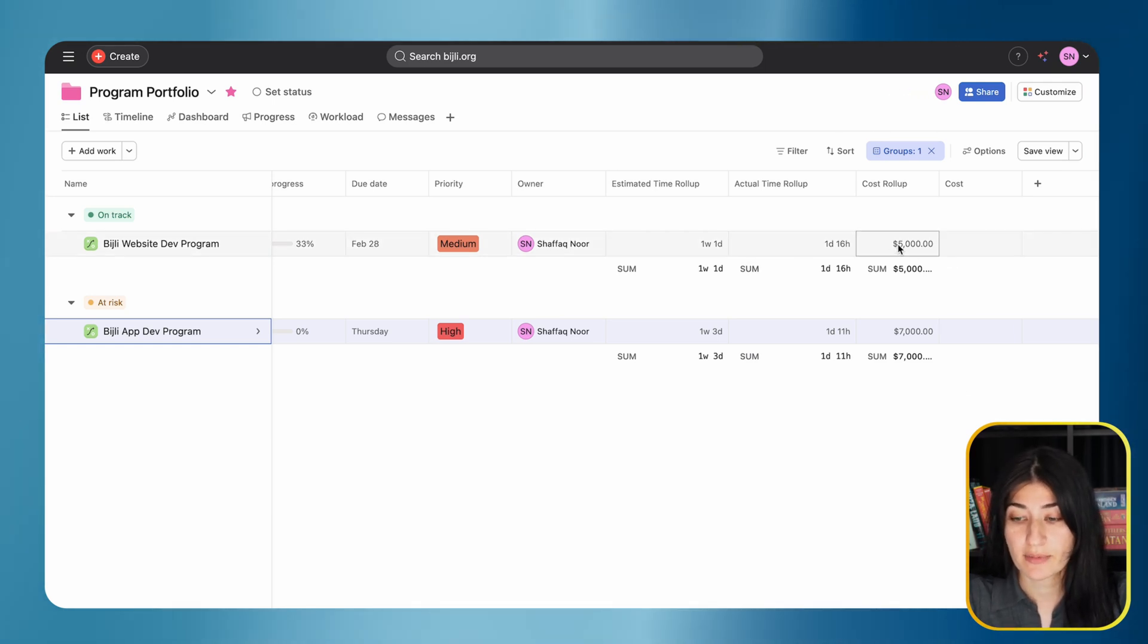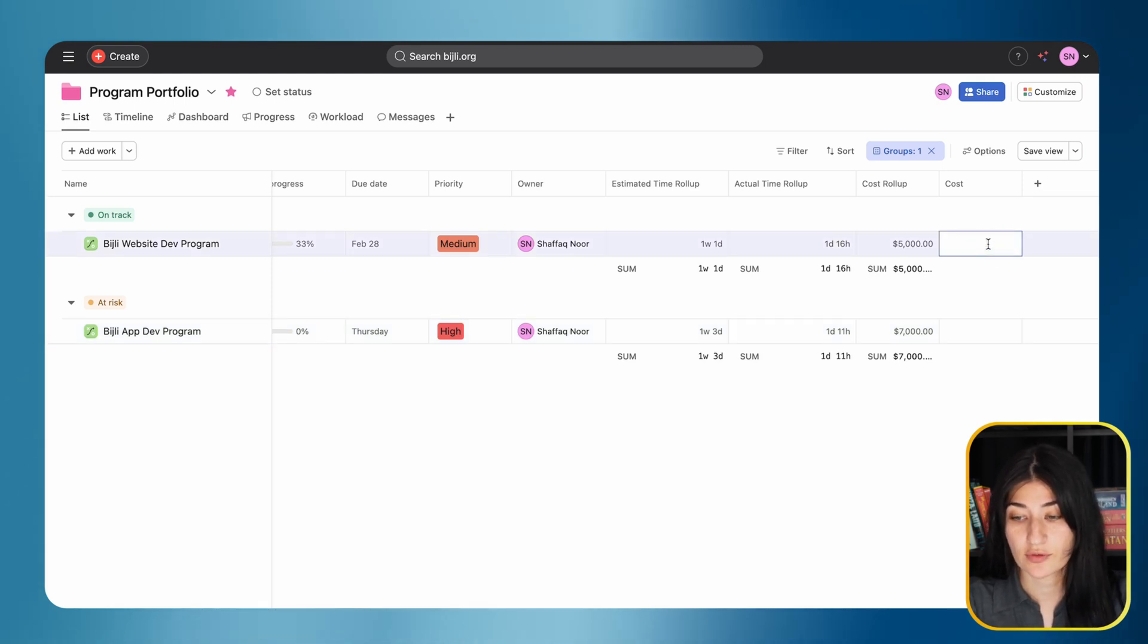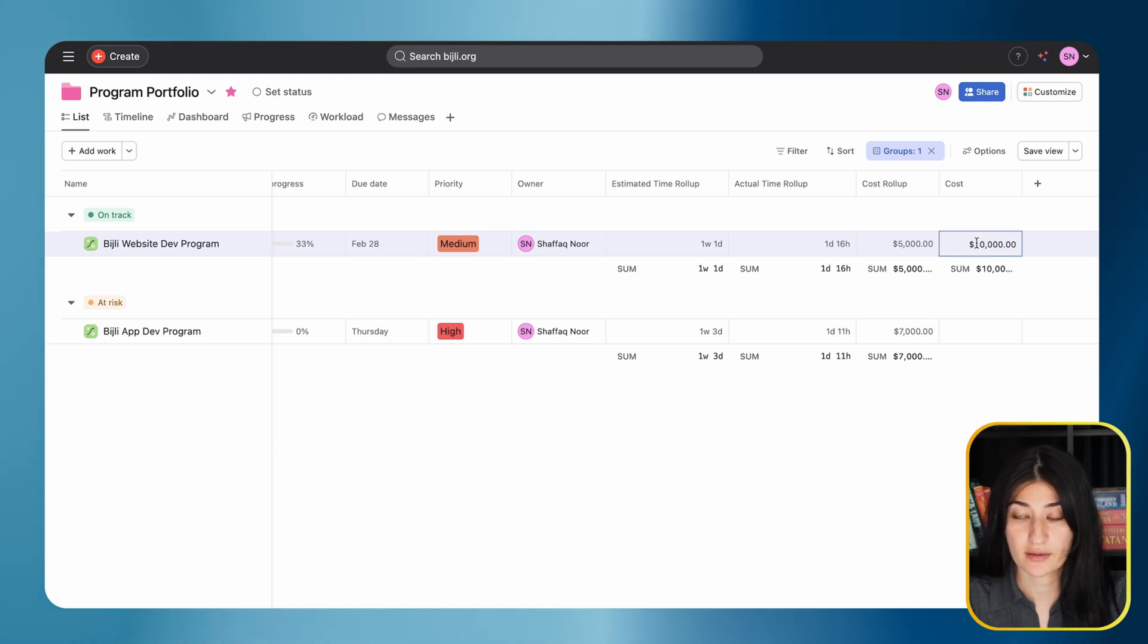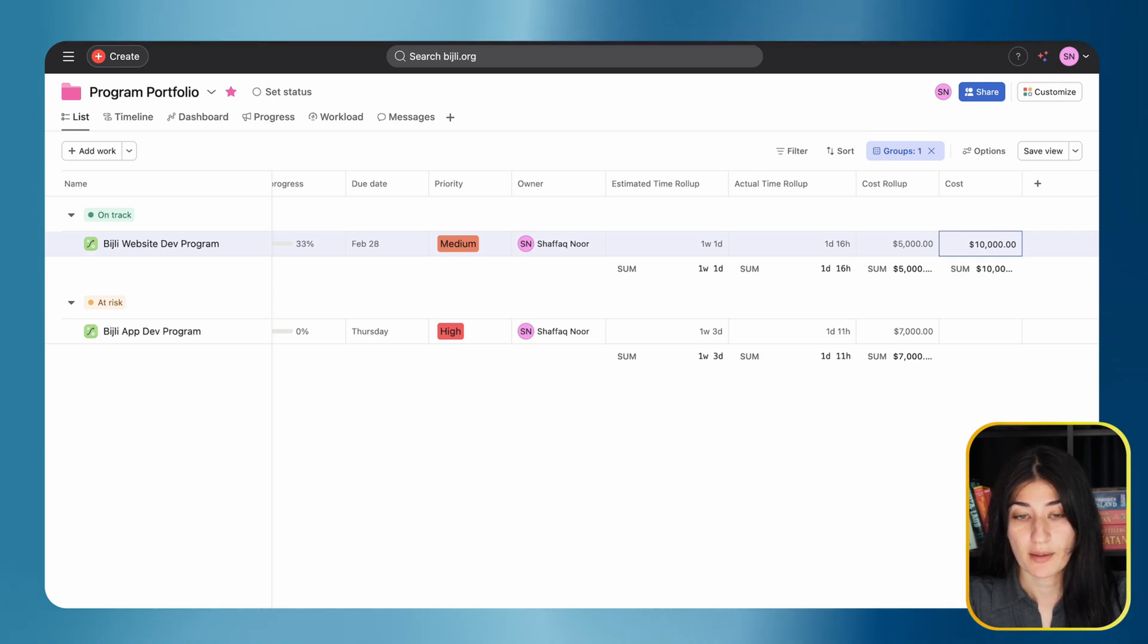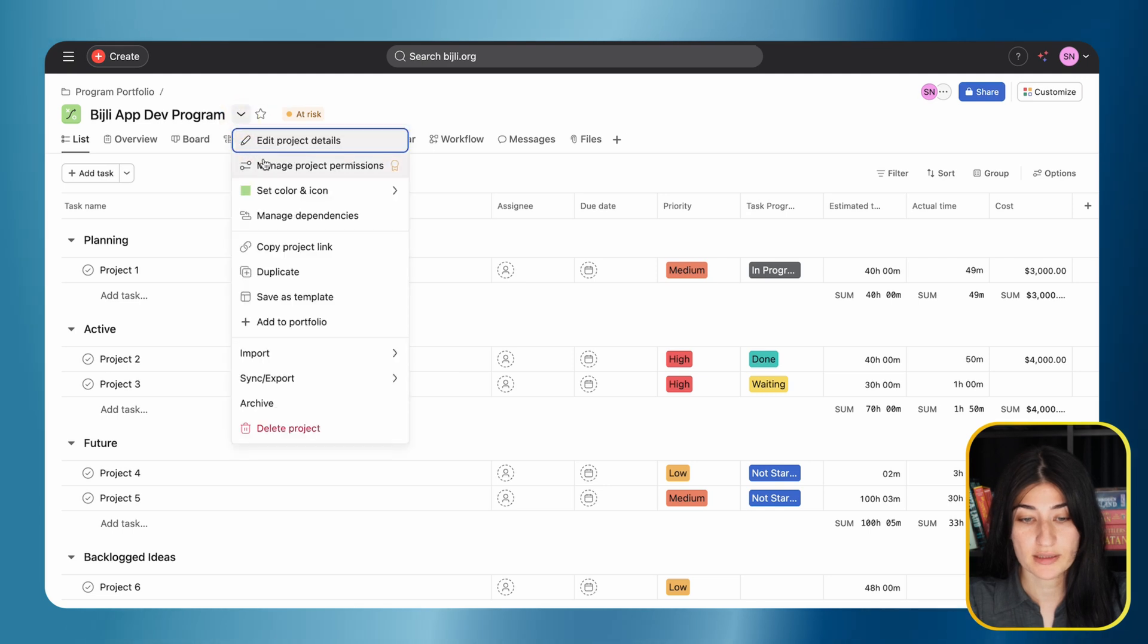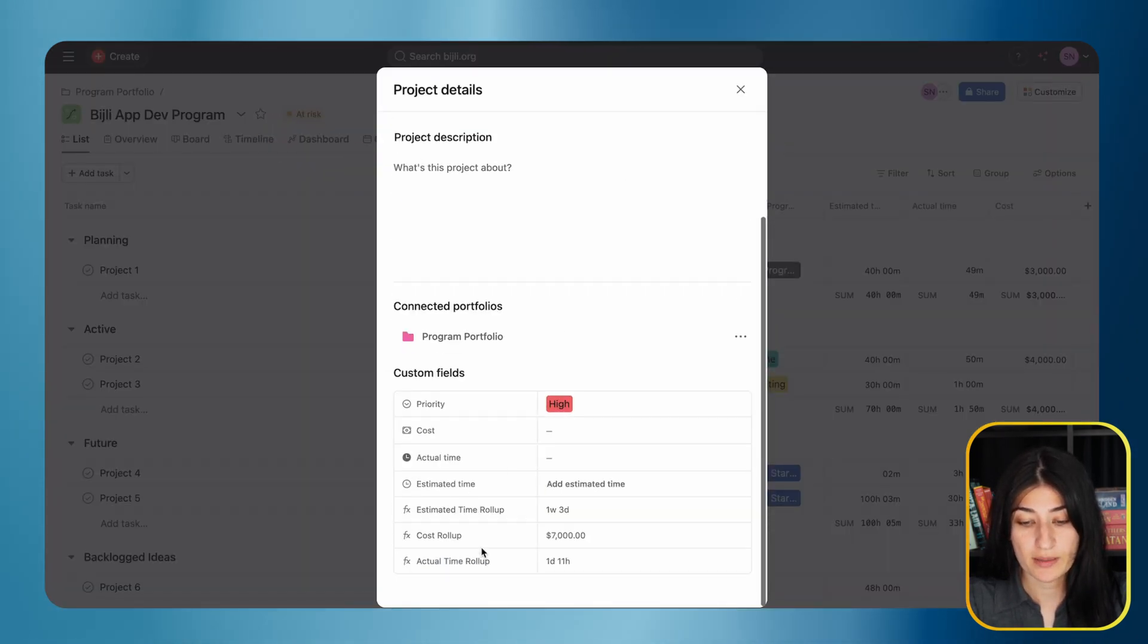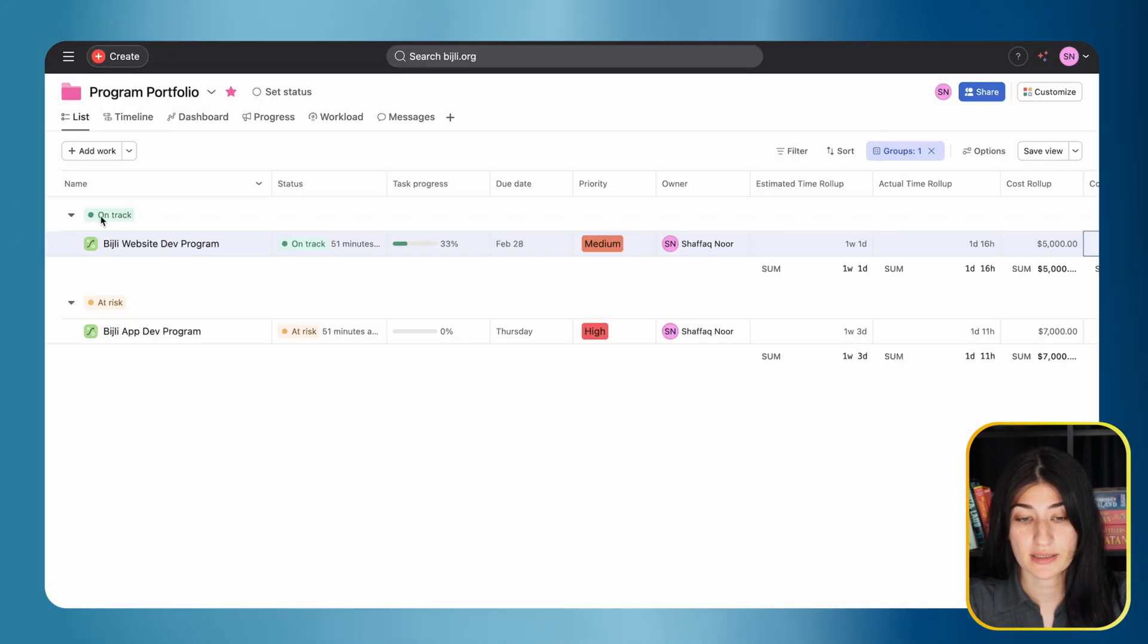This is my cost roll-up for my projects within my program. But if I have a cost for the program itself, which is $10,000, I can set that. If there are fields we want to use for the portfolio level, we're able to. What's really nice is these fields all show within the project details as well, so for my app dev program I can see the same information my program manager sees in the portfolio view.